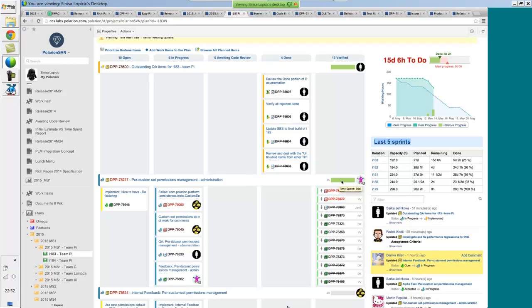As I was saying a bit earlier, we also have specific defect user stories that deal with the defects backlog. We have certain ratings or certain levels that we're trying to achieve, and we follow this through by ensuring that around 10% of capacity is always burned on defects as we go through the sprint.